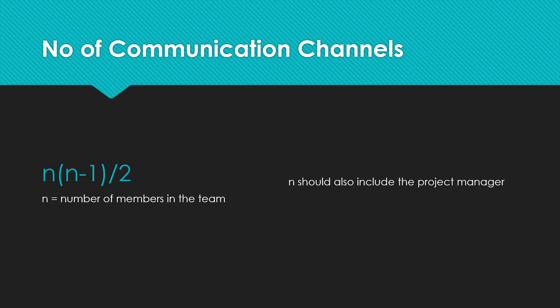The number one formula is communication channels. N into N minus 1 divided by 2, where N is the number of members in the team. This is the formula for communication channels, and N should also include the project manager. If you are the project manager of a team with four other members, the value of N is 5, not 4. Always include the project manager in the value of N.